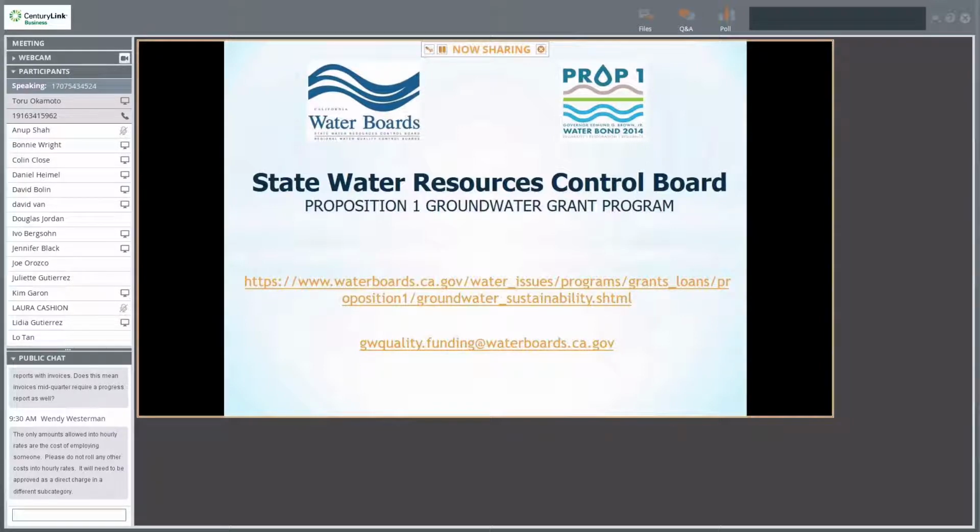And then in terms of the match, if we end up with more matching funds than we had promised, do we still continue to report matching funds even if we have gone over and above what was required? Yeah, I encourage them to show that. It's the total project we're looking for, so we may not scrutinize those costs as much as we would something that's required in our agreement. However, it's not a bad thing to keep submitting and just to get a picture of the total project. And also, sometimes in the end, we find out that some of the match costs we allowed were not eligible, and then we have an easy way to identify additional match costs that you could include.